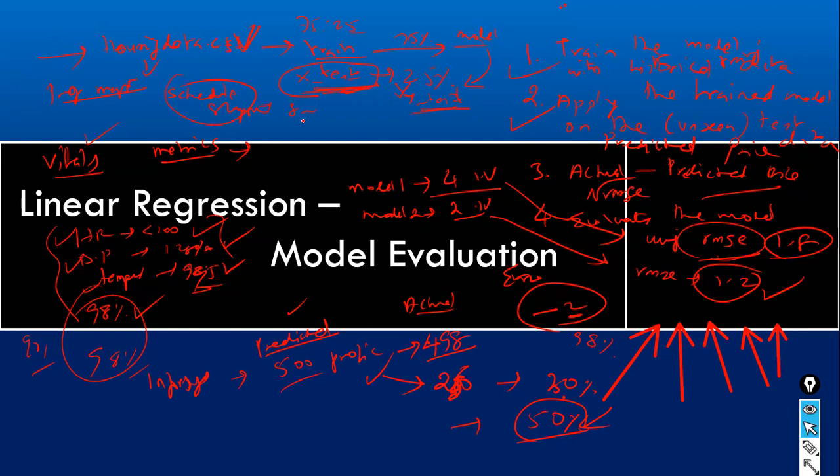Have we completed the project on or before 8 months? If not, then you have slipped the schedule. So the metrics are schedule slippage and defect leakage. How many defects did we get? If the defects are well within the limit, then it is good. The defects are not much, and there is no schedule slippage. We are on time. So these are the metrics.